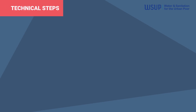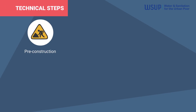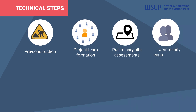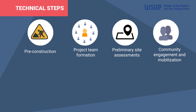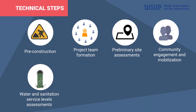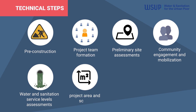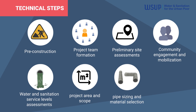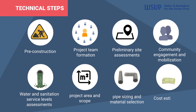The technical pre-construction steps include: project team formation, preliminary site assessments, community engagement and mobilization, water level and sanitation service level assessments, identification of the project area and scope, subdividing the area into blocks, checking pipe sizing and material selection, and cost estimation.